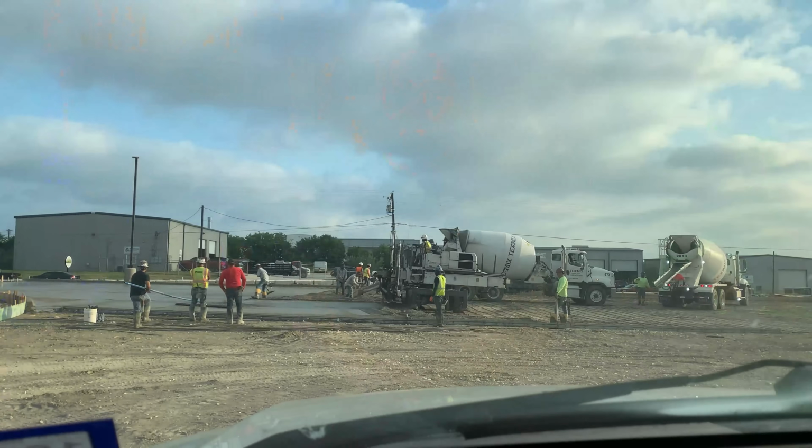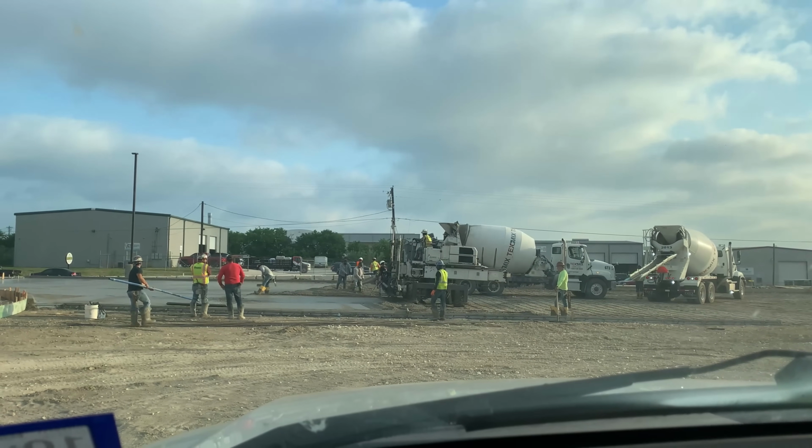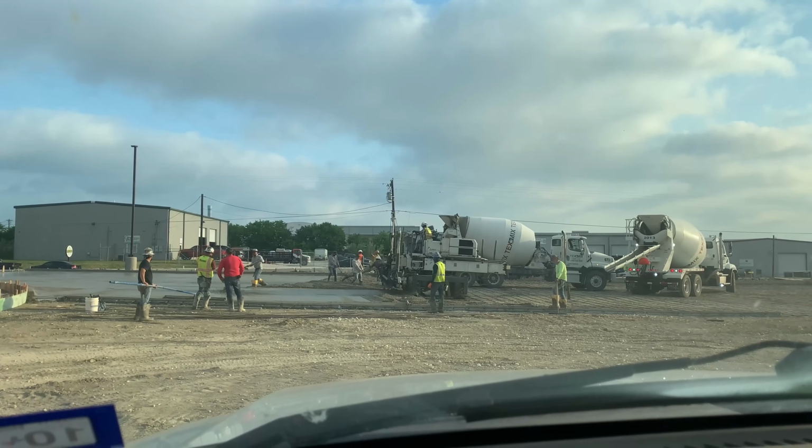But this needs to be done very, very early. So usually around the time that the slab is being poured, sometimes before, sometimes after, just depends on the needs of the job. But you don't want people out there on this site trying to do construction and they don't have power and they need it, because then they can't move things forward, and then you're holding up this entire job.